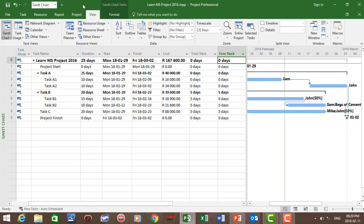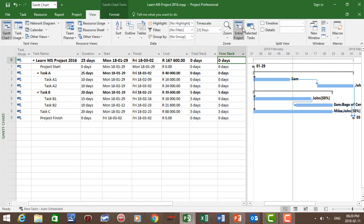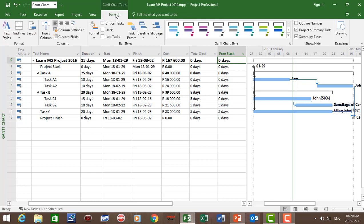Go to View Entire Project, then go to the Format tab. Click on Slack to see where your total slack is on the project. We can also click on Critical Tasks to see the critical path of the project.